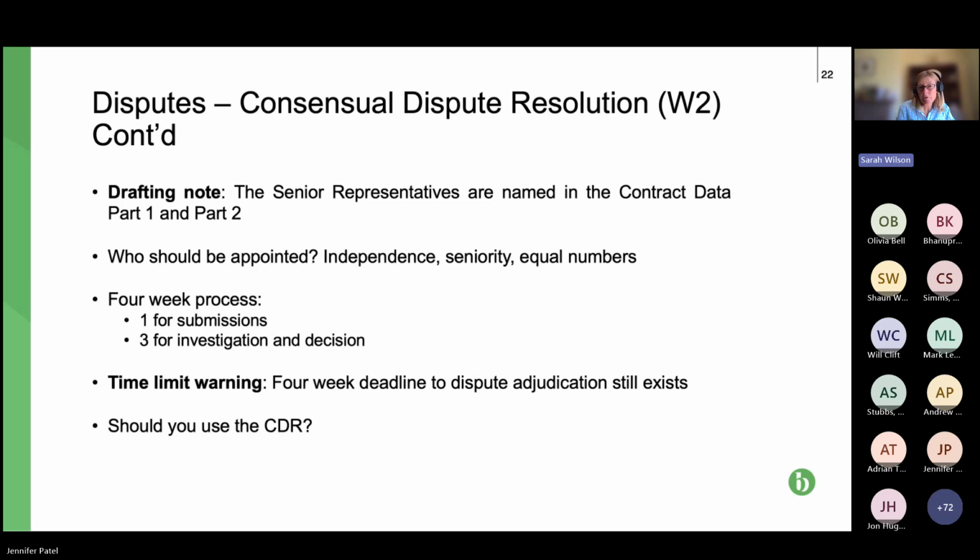So, for example, they could reach an agreement that a particular CE is a CE, but possibly not as to the consequences, i.e. as to the time and money. So they need to carefully consider what the agreement is, if any form of agreement is reached.